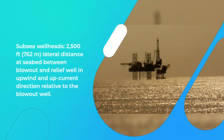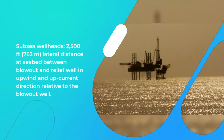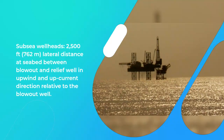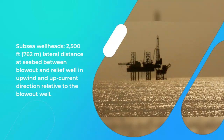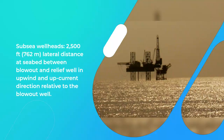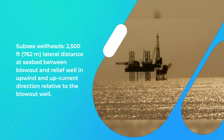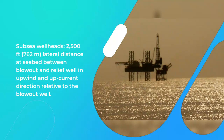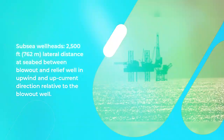For subsea wellheads, a lateral distance of 2,500 feet (762 meters) is required at the seabed between the blowout and relief well, in the upwind and up-current direction relative to the blowout well.